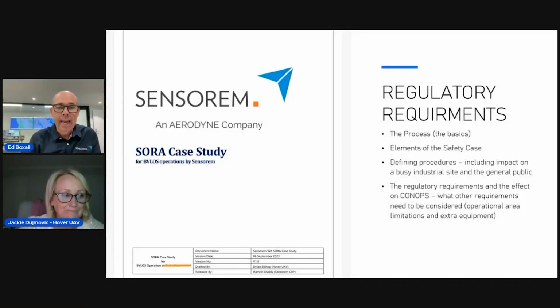Yeah, definitely. Again, our client expected that there were going to be cost increases. So we tried to keep those to a minimum, which was great. But definitely, it's not just the cost of purchasing a dock unit. The comms cabinet, for example, was obviously more expensive. And then you get things like even a Starlink. You start streaming, and it might sound like it's unlimited data streaming, but all of a sudden you're recording every single time you fly. You are now uploading that data every time the drone lands, and you get unexpected costs that come in. Not huge, but certainly unexpected.